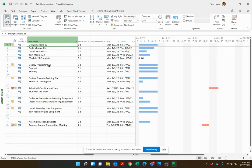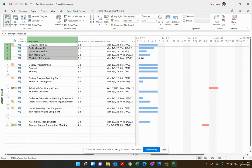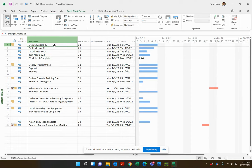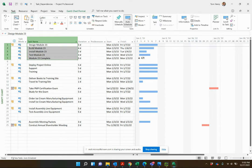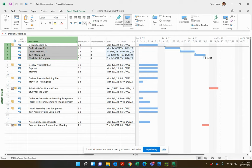In the first exercise the goal is to perform all the development tasks in series — design, build, install, test — so that module 23 will be complete. The easiest and my preferred way is to click on the first task, drag down to the last task, go to the Task ribbon, and select Link Tasks in the Schedule section. You can see it's linked all the tasks together and they're now being performed in series.